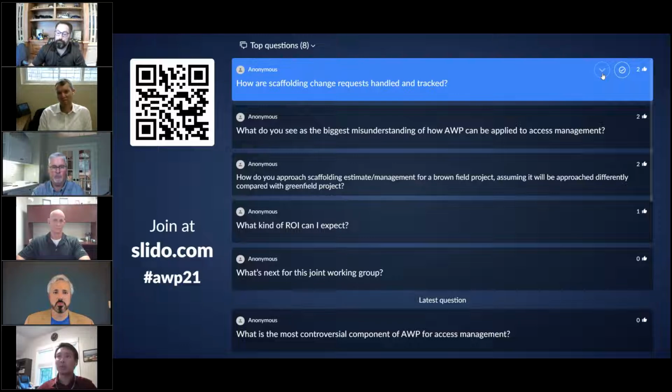And that's where I think we run into a lot of issues, and that's what we hope to address by moving to a quantities-based project controls framework. In that scenario, when you exceed the estimate, you just track your overages against this single bucket of scaffold for the project. Yeah, and then the issue is sometimes you don't even know you're over the budget, because if you're 25% of the way into the project, even if you're running 50% over, you don't necessarily see that you're running over the estimate yet. You don't know until you're far too late into the project to do anything about it.